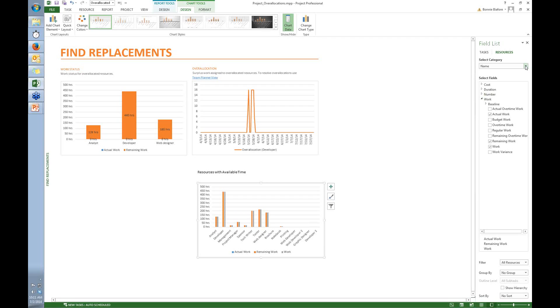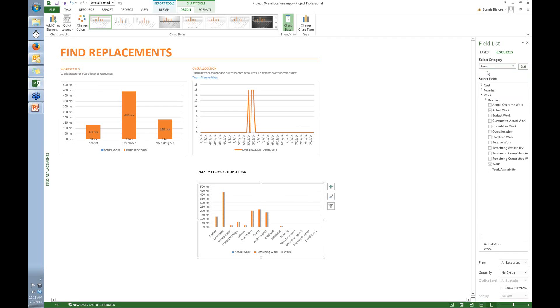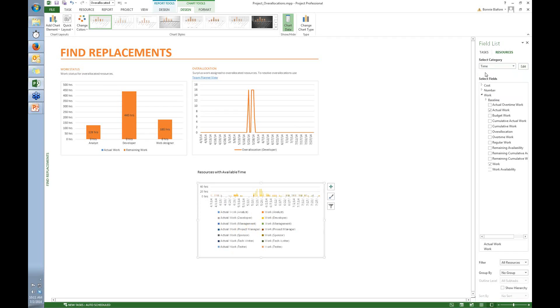The other thing I want to do is the category says Name. Well, I don't really want the resource names. I actually want this to be by time, just like the one up above. That's how I'm going to find my replacements. So in the select category, I choose Time. And now you can see that it's got the time on the x-axis. So now we're getting somewhere.